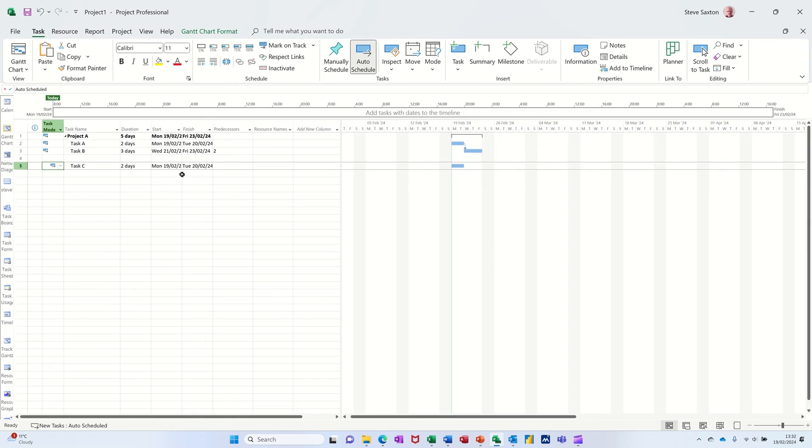However, what that causes is people not to notice that these tasks are not being summarized correctly because they've been left on manual scheduling.